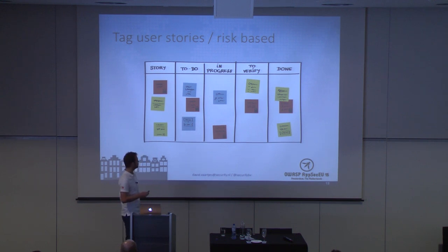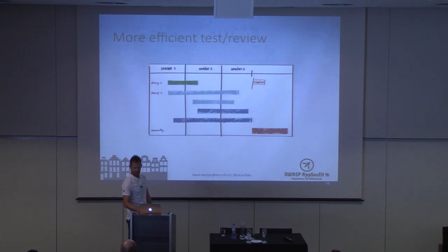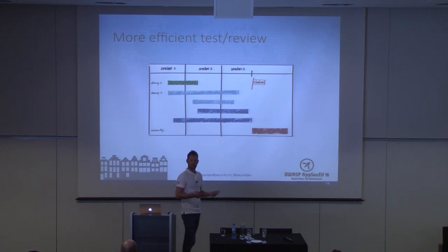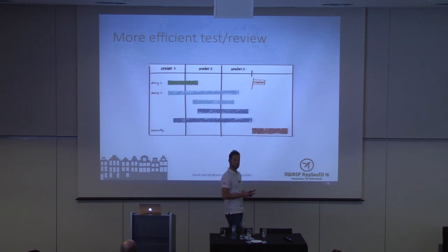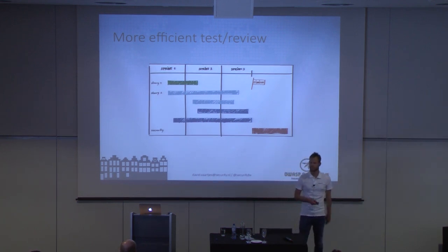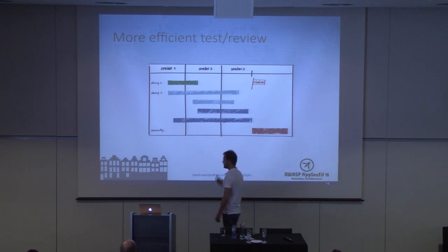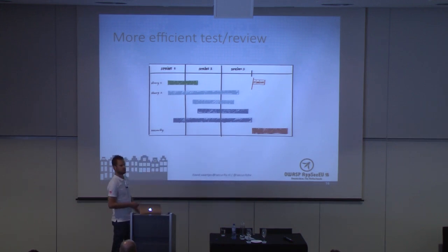Because remember, at the moment we were still doing this pen testing approach, but because I was joining this grooming, I could very well prepare for such a test. So I knew what was coming. I knew how many security relevant changes were in there. I knew which requirements we should check. So we were able to upfront schedule for a 5, 4, 3, 2, or 0 day pen test. So we got some return on investment here because the pen test we did was way more efficient than we did before. But we were still doing the pen testing thing at the very end. So they were still blocked by security, only the security test got a bit more efficient.